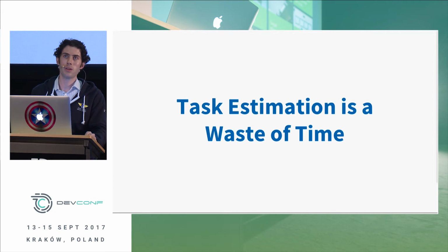What we did instead was just trying to have each task be an equivalent size. And we didn't worry too much about what that size was, but as long as things were consistent, that gave us the predictability we were looking for of knowing when things would get done. And actually, my team's best period of predictable throughput, where we were setting high commitments and meeting them, was when we simply said, we will do 10 tickets every 2 weeks, and didn't worry about the sizes.